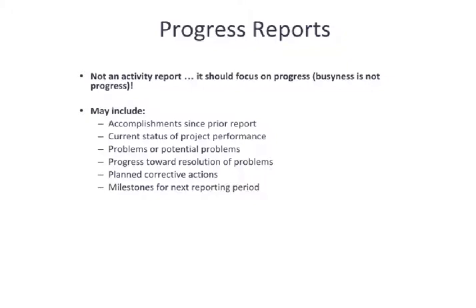What is being talked about here when you say problem or potential problem is something that is somewhat out of your control that could impact the project. For instance, we need to buy a significant amount of steel for this particular activity, and we've learned from the supplier that they can't provide it. There's a shortage of steel right at this point in time, or the price has quadrupled, and we now have a significant limitation on our supply chain. That is something your supervisor likely needs to get involved in because it may be above what you can address yourself.